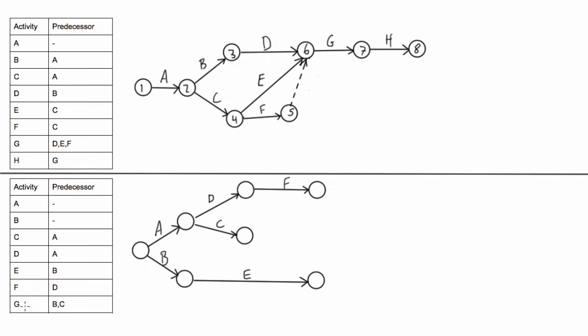And then lastly we would have activity G and its predecessors are B and C so we're going to need to come off of C and then connect B to this node with the dummy.